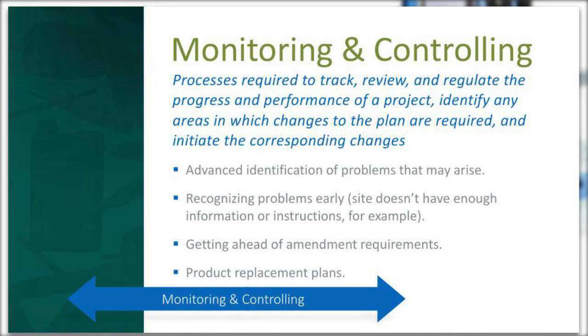The same thing with calibration of a scale. It's a different plan, but what is your plan to have a technician on site or to have a replacement in there prior to its calibration expiration to make sure the site can seamlessly operate during that time frame? And also part of your replacement plan is what is your plan if a product breaks or if a piece of equipment that can't be shipped back needs service? Is that all in place so that you can easily course correct as the trial progresses?